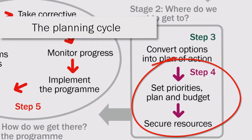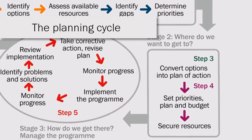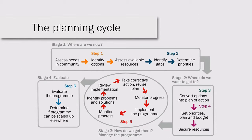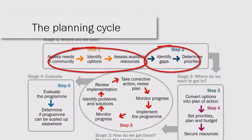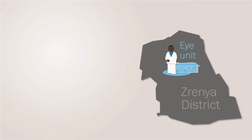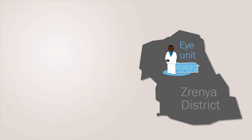In this session we will be discussing step 4 of the planning cycle. It is important that a plan's aims and objectives have already been agreed and prioritized before any practical decisions on time and money are made. Let's look at an example.